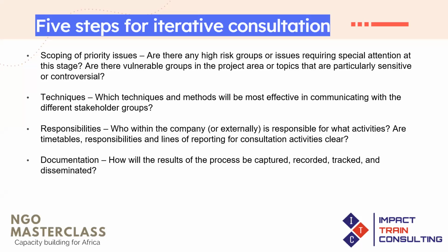And then you need to document. These are all things that you need to do when you're planning for consulting with your stakeholders. How will you capture the results? How will you capture the process? How will you record? How will you track the consultation? And how will you disseminate information regarding that consultation visit that you had with your stakeholders?